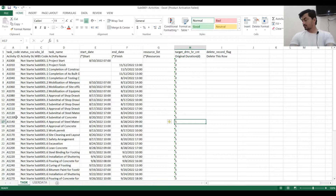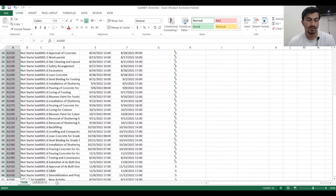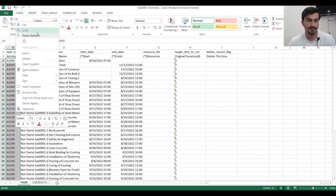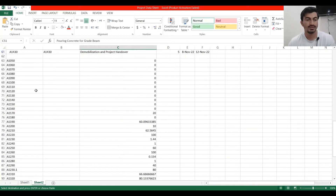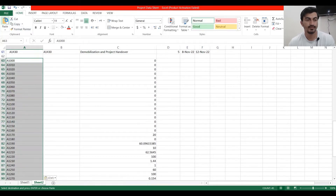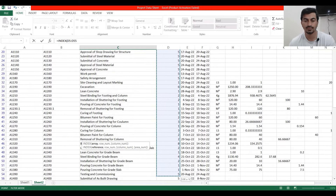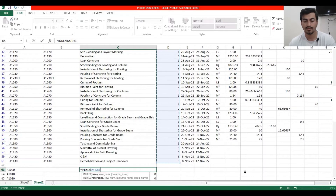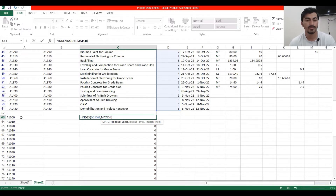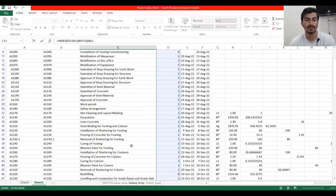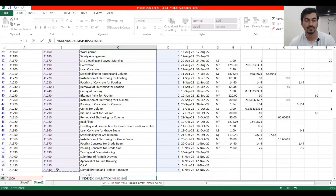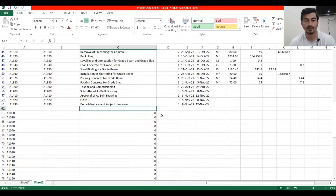We want to import this duration. Copy the Activity ID and paste it into our data sheet. Make a formula using INDEX, then select the duration array, comma, then MATCH, select the lookup array, comma again, select the lookup array, comma, exact match. Close the bracket and drag it down.